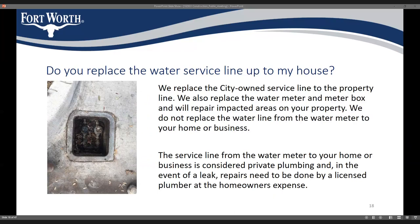We only replace water services up to your property line and don't make improvements onto private property. We will be replacing the water services up to the property line, and you'll get a new meter box and a new meter.